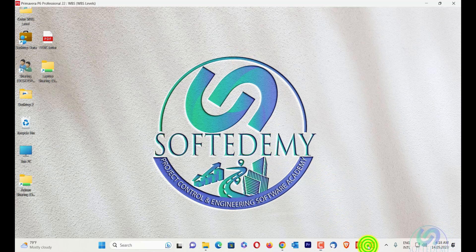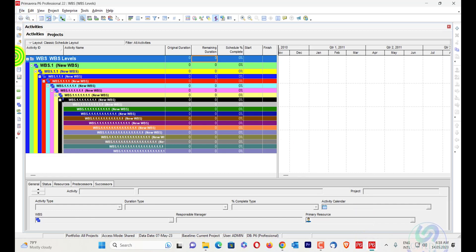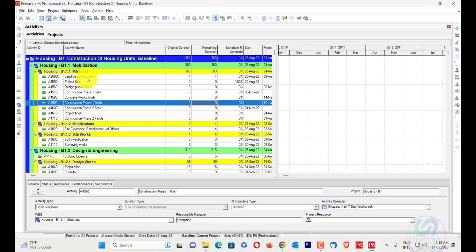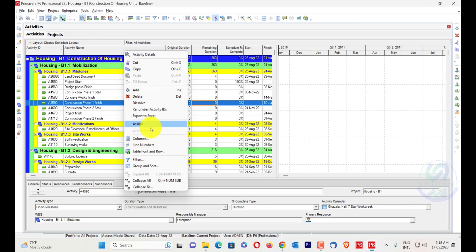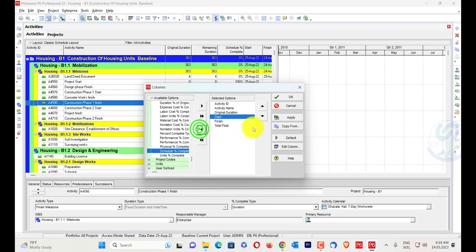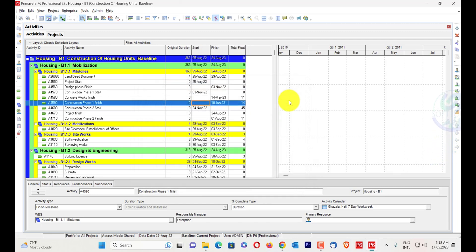I'll go here in my Primavera P6 — you can see my project here. I want to create a similar project in Excel. I'll use only four columns: activity ID, activity name, original duration, start, and finish. Total float will not be needed to create the complete Gantt chart.